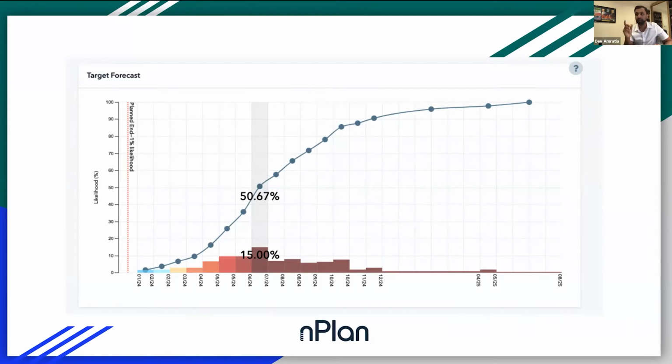for the contractor, where the contractor is not just being awarded for, I'm paying you an amount of money to go do the work, but I'm also going to pay you an additional amount of money as you demonstrate to me that you are reducing the risk profile of this project. Why? Simply said, the client makes more money if that happens, right? So take a share of the prize here. This is slightly different incentive mechanisms to what we may have seen previously, such as target cost contracts.